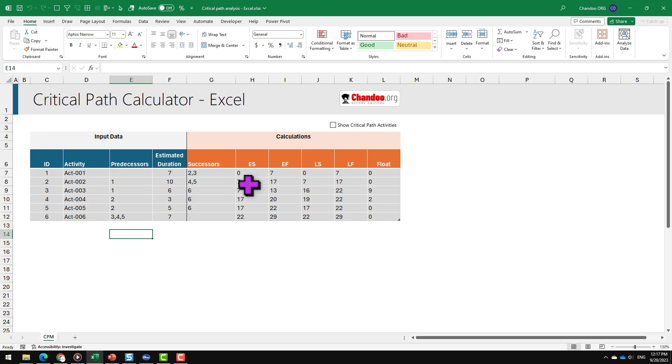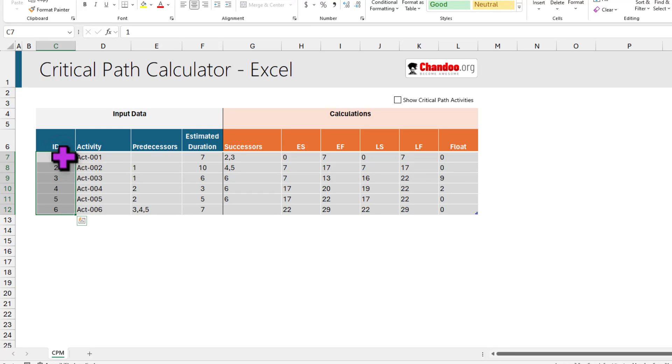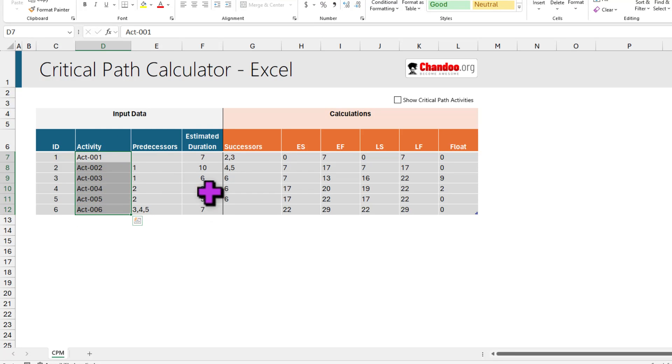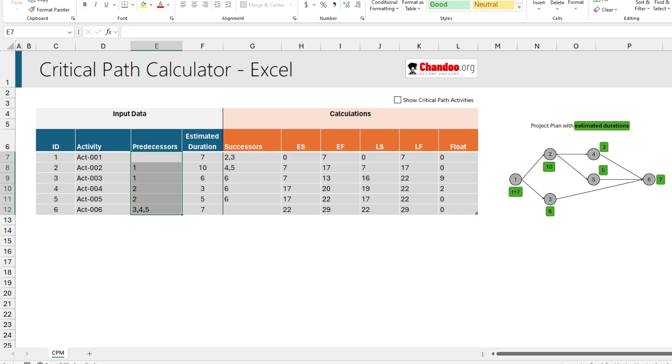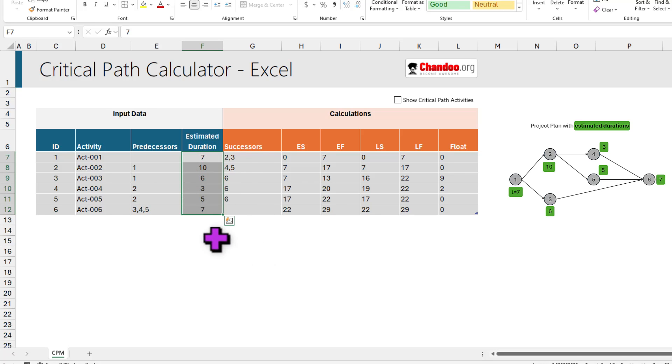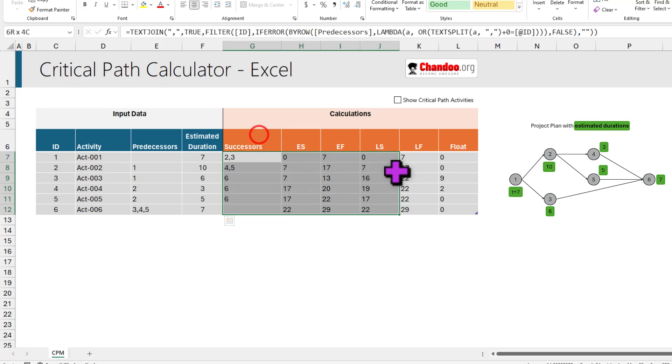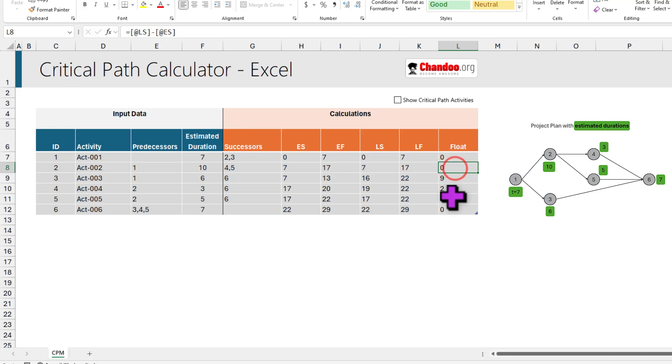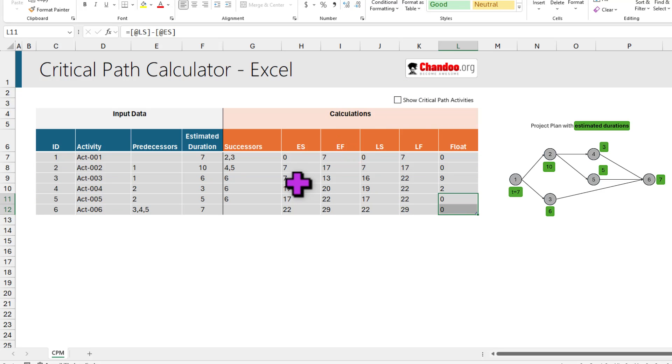So here is my critical path calculator workbook. Each activity has a unique identifier in the ID column, and the name of the activity goes here. In the predecessors column, I have listed the predecessors for each activity. I'm going to put an image of the project plan here so you can refer to that. If there are more predecessors for an activity, like activity 6 depends on 3, 4, and 5 to be done, then we just comma separate them and list them there. And then the estimated duration for each activity is entered here in number format. Given these, I have done all of these calculations, and wherever the float is 0, those are my critical path activities. I can highlight them if I want. Now, let me quickly explain the formulas.